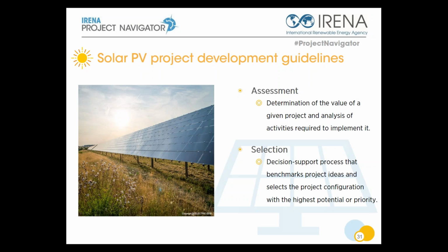And at the end, a configuration that we recommend as favorable exceeds a value of 200. It's some points that you assign for different criteria, and in the end a configuration that has more than 200 points, given the different weights of criteria, can go on.